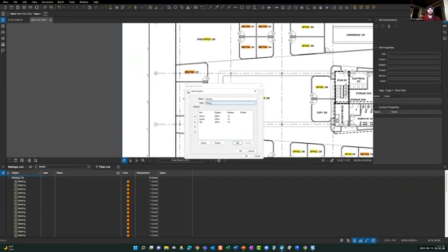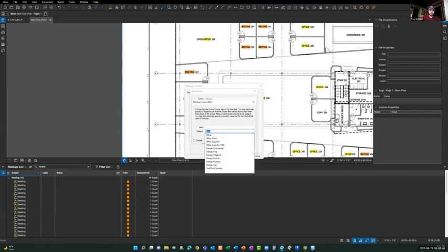And whenever I make a choice, one tip that I'll throw in here is I always put a blank one in. So I'm going to add another one. I'm going to say blank. I'm going to do office. I'll show you why in a second. I'm just going to apply 0, and I'm going to make this one my default.